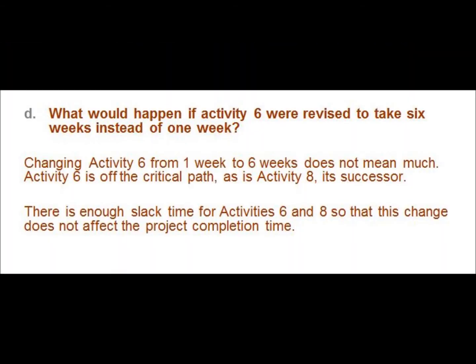And when you've done that, the last piece is, what if we have activity 6 as a hiccup in it? What if something happens on 6 and it were to take 6 weeks instead of 1 week? So figure out, if we have a problem, what happens to the entire project. And again, pause the video, figure that out, and unpause the video when you're done to see what my answer is.